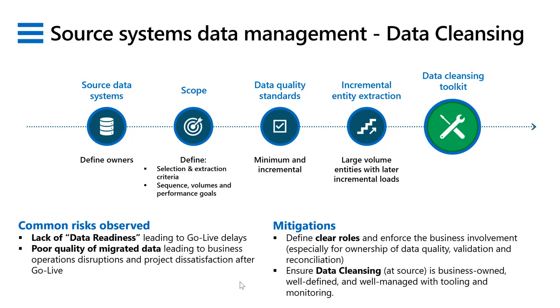And a couple of mitigations. One is making sure that the data cleansing at source is business owned. It's very well defined in terms of what do we mean by data cleansing, what is good enough quality, that it's well managed, and we as a project can provide them with some tooling and some monitoring to make sure that the data quality is something that you can actually assess and you can monitor the progress. You can track that the cleansing of the data in the source system is likely to complete within the time period that you need it to.